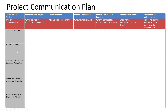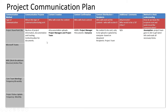So we have a project SharePoint site, Microsoft Teams, a work breakdown structure and action plan, core team meetings, and project status updates. You can have a lot more in here — you can lay out every type of meeting and even change management aspects for announcements to end users. I do mine in a PowerPoint and slip it into my charter. As a project manager, it is my job to decide how communication is going to unfold in this project.